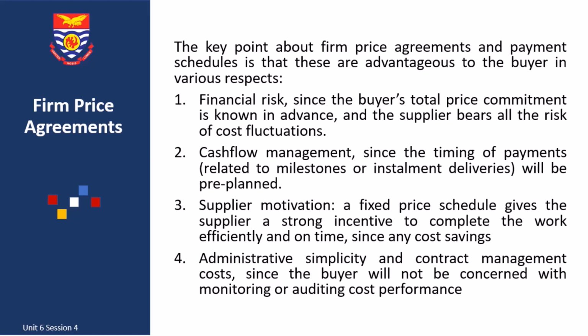In other words, the amount of the supplier's profits depends on the actual cost outcome without a minimum or maximum profit limitation. If at the end of the project we have some surplus, the supplier is going to take it. The buying organization has no share in this surplus. In the same way, if there are cost blowouts, the suppliers are going to bear these excess costs.